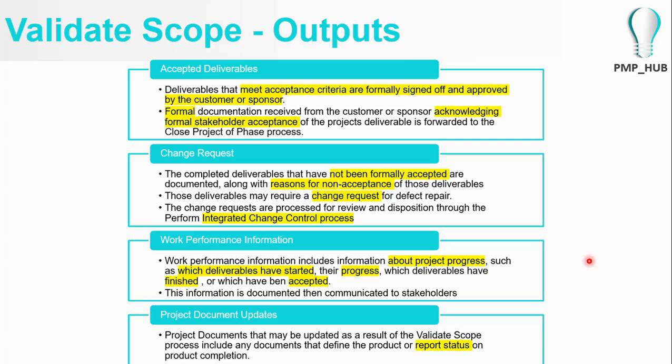Sometimes everything gets backfired and the customer is not happy, and sometimes the customers might sign off the acceptance with a footnote saying, okay, I will sign it off, but subject to these amendments. So backfiring will definitely constitute a change request coming in, and if the customer is not satisfied, you might develop your case: no, that is what the scope said, and that is what you agreed, and the customer will say no, that is not the thing.